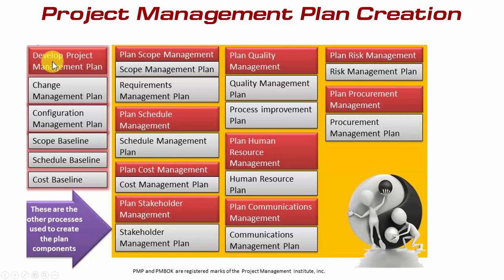In fact, within that particular process, the change management plan, configuration management plan, and the three baselines are created. But the rest of the plan, under the planning process group, is assembled in the other processes. And I've listed them here for your easy reference. Under the process plan scope management, that's where the scope management plan is created, along with the requirements management plan.